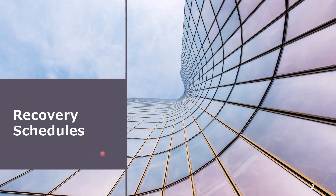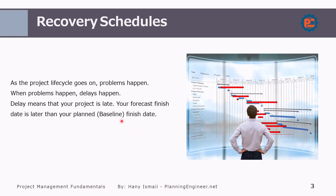Recovery schedule is a very important schedule. Usually we have to do it at a certain stage in the project, because as a project life cycle goes on, problems happen and when problems happen, delays happen. That means if your project is late and your forecast finish date is later than the planned date, which is the baseline date, then you have to create a recovery schedule.